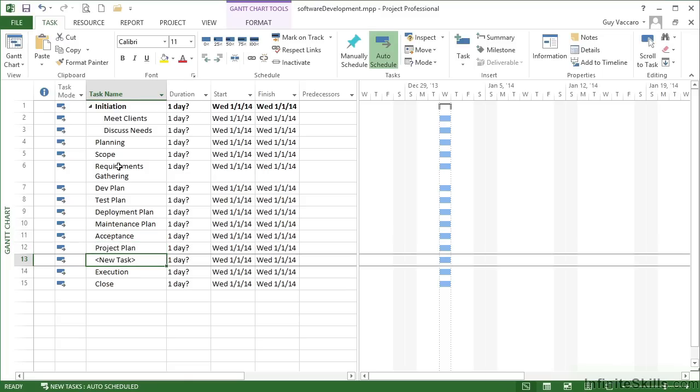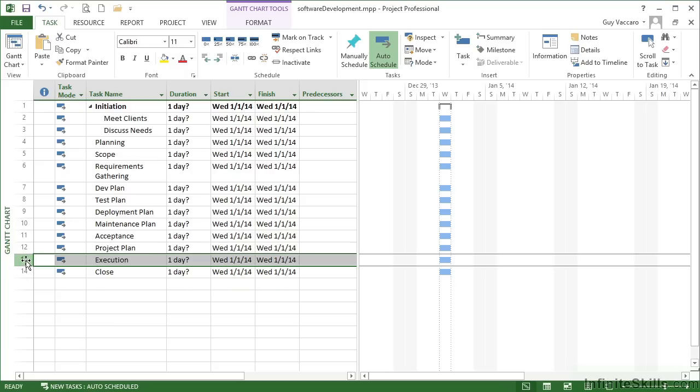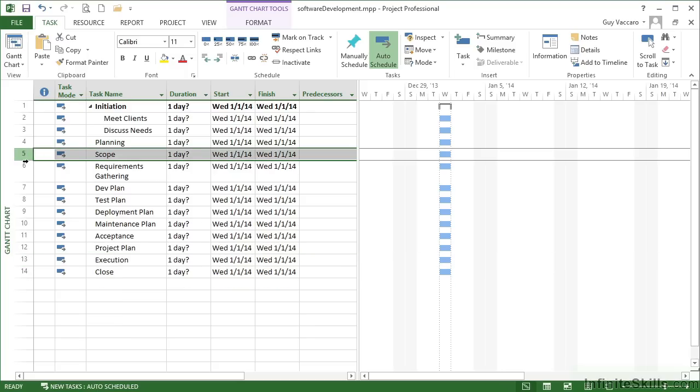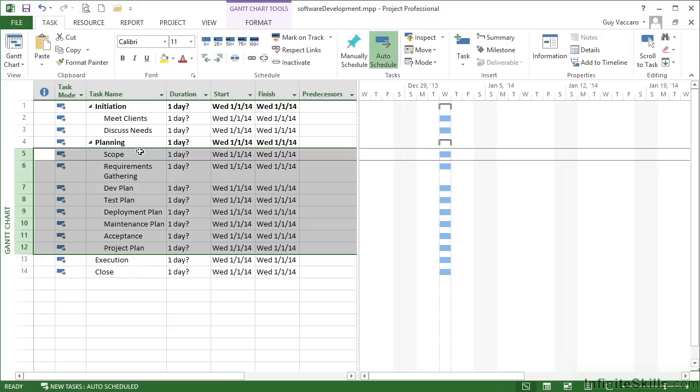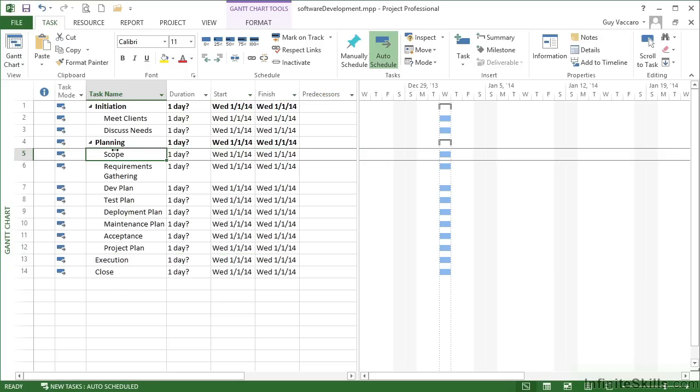Then the actual project plan itself. I happen to have inserted too many, so we can delete this one by highlighting the row and then delete on the keyboard. Everything from scope down to project plan is to be the sections within the planning phase. So by highlighting from five to twelve and then doing the little arrow to the right option, effectively indenting these tasks, they all become subsections for planning.